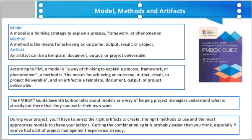A model describes a thinking strategy to explain a process or framework of phenomena. A method is the means for achieving an outcome, result, or project deliverable. An artifact is a template, document, output, or project deliverable. Sample models include process groups, ADKAR, situational leadership, Cynefin framework, and Maslow's theory of needs. Sample methods include probability and impact matrix, lessons learned, project closeout, story point estimation, net promoter score, and wideband Delphi. Sample artifacts include project charter, risk register, stakeholder engagement plan, prioritization matrix, user story, and value stream map.